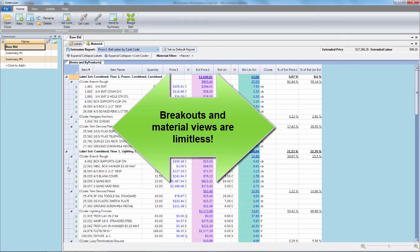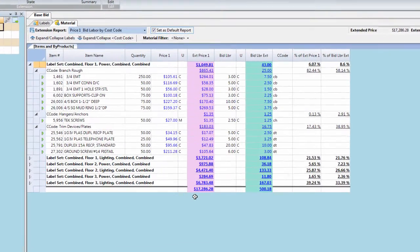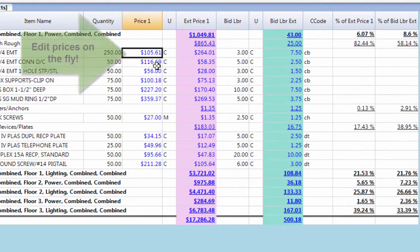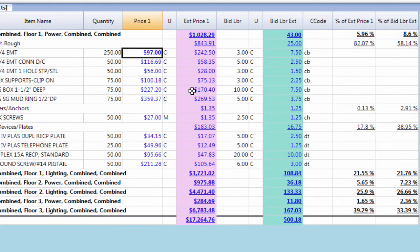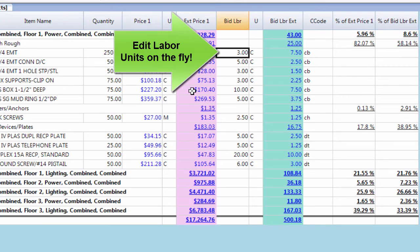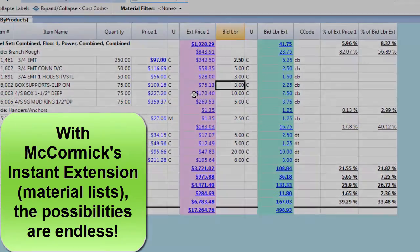With McCormick's Advanced Extension, you are able to make changes on the fly without affecting your permanent database. Here we will make a change to price — see the instant totals? This is the same with labor: change any labor unit you want for this job. With McCormick's Instant Extension reports and material lists, the possibilities are endless.